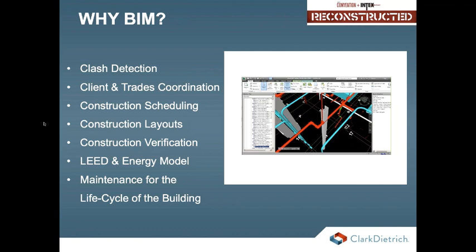And you can imagine taking those problems later on is just a nightmare trying to figure out who's going to move what in the field. So getting it all taken care of up front, you change the model, you can keep on going throughout the rest of the building and see the rest of the clashes the same way.